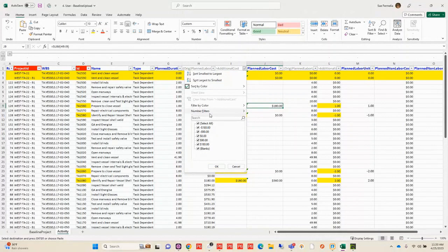So on my earthworks for my FP spread 1, I have units in both May and June. And then for my FP spread 3, I want to put units in for all 3 of my resources in the month of June. So I can do that all at once. I can go ahead and go out and I can upload.